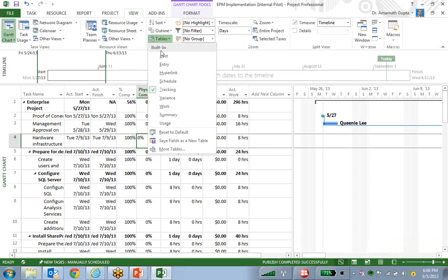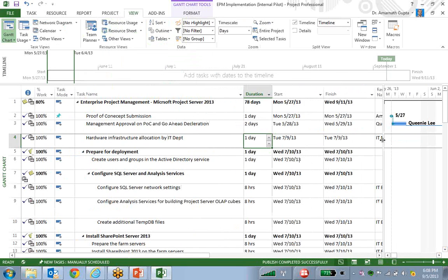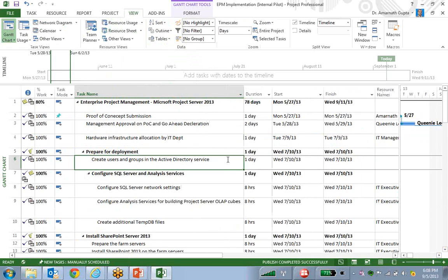So any project manager, any person, will be able to see whether the project was delayed or the tasks are on time, how many days delayed, what the cost expenditure is, and even the cost variance. Because if a project is taking more time, if a one-day scheduled task is taking 5 days, that means it has an additional cost. Even that we will be able to see.